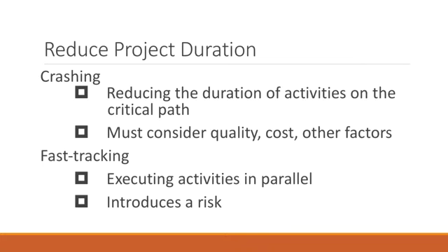One of the ones that we have is either crashing or fast tracking. So what do I mean by crashing? What I mean by crashing is that I'm going to reduce the duration of the activities on the critical path. Think about how I could reduce the duration of the activities on a critical path. Just give it 10 seconds of thought.